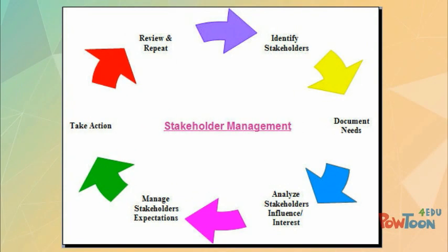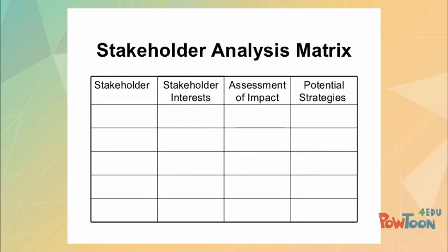First of all, let's define stakeholders. Stakeholders are all those that have an interest in the project and everyone who is affected by the results of the project. Not all stakeholders will have a voice in the project expectations. Key stakeholders are the ones that need to be satisfied by project outcomes in order for the project to be deemed successful. The planning for the project must revolve around key stakeholders' expectations. It is important for stakeholder analysis to be completed in order to list all stakeholders and their influence to the project. This will assist the project manager in managing the priorities and expectations of the project.